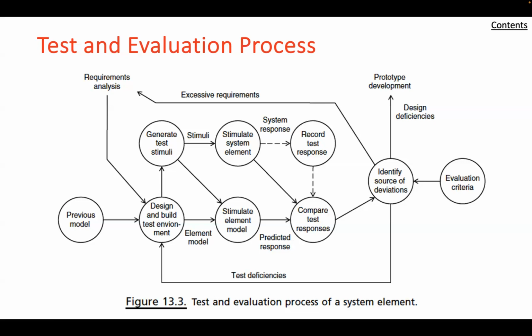There, in terms of specialty test equipment and test facilities, simulation of the system operational environment for the purpose of system test and evaluation can be a task of major proportions, sometimes approaching the magnitude of the system design and engineering effort itself. So we talked about facilities before, and so having an adequate test facility can be quite significant. In the advanced development phase, this aspect of system development is not only very important, but frequently is also very expensive. Thus, the judgment as to the degree of realism and precision that is required of such a simulation is an important systems engineering function.